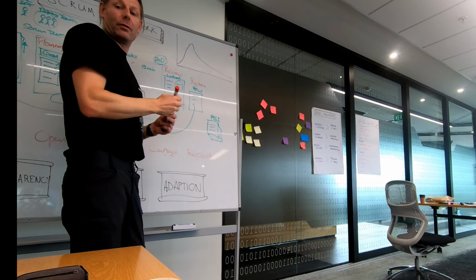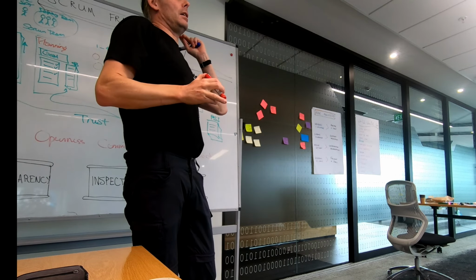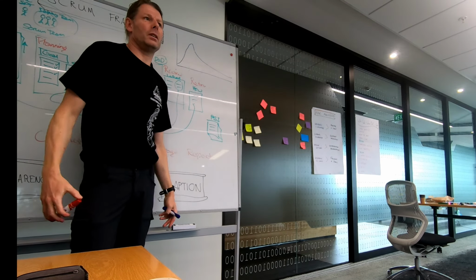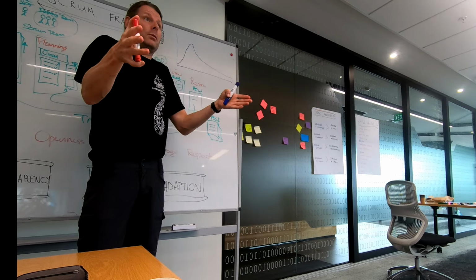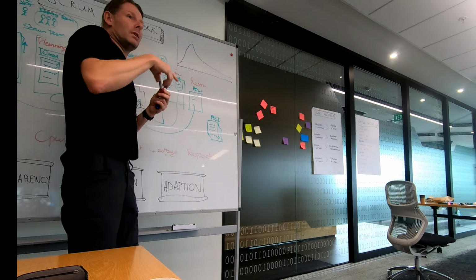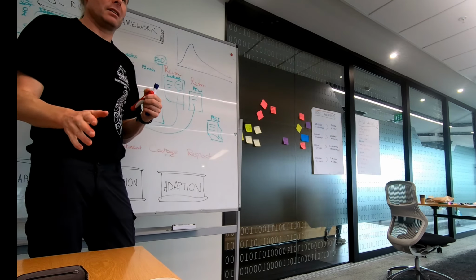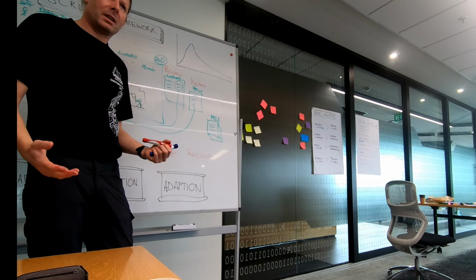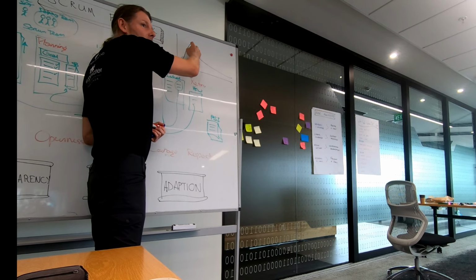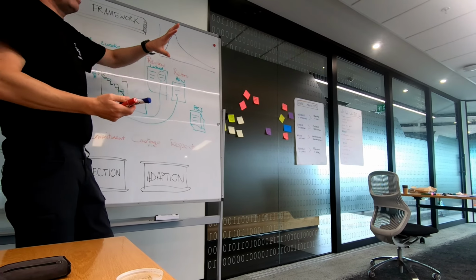If you overestimate by far, people won't believe you, you'll have no credibility. So if you say it's going to take 2 weeks and you suddenly do it in a day, people will say, well, why did you take 2 weeks? So even if you said it's going to be 2 weeks, you'll make it 2 weeks. And it's the student syndrome and Parkinson's law. But if you always estimate and you're wrong, so you always say it's going to be 5 days and it becomes 7 days, everyone will never believe you because you're always wrong and they buffer it. So you're in an impossible situation. Statistically, you want to be 80%, 2 sigma off the curve of the... Right, but then the world's a complex world and we just don't know. We want to just get rid of this.